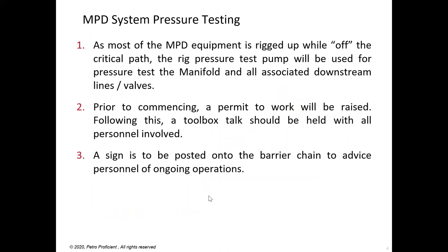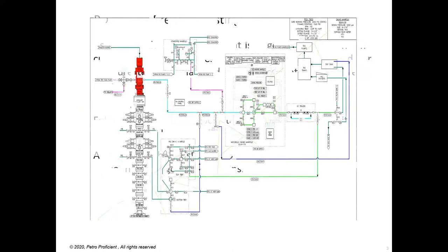So what is the MPD system pressure testing? As most of the MPD equipment is rigged up off the critical path, the rig pressure test pump will be used for pressure testing the manifold and all associated downstream lines and valves. So let's go back here. Now, all of this equipment that we are seeing here will be rigged up.